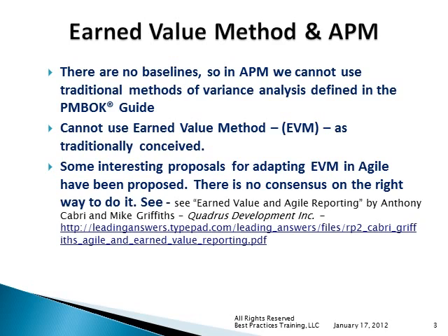There's some very interesting stuff using burn down charts, burn up charts, and velocity, looking at the change in the burn down rate over time for the project. In some ways, this is tracking ETC, estimate to complete, putting it together in burn down charts over time, and being able to estimate when you're actually going to be done. It would be pretty cool, I think, to add some of these techniques into more classical ways of doing projects.